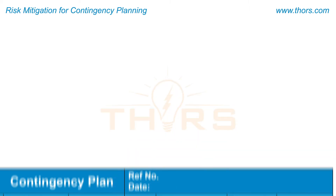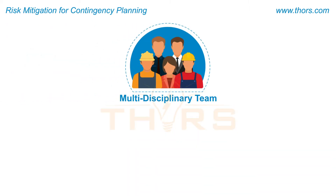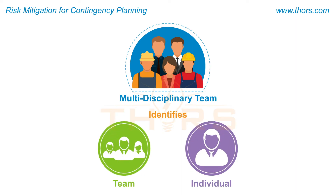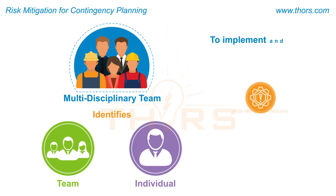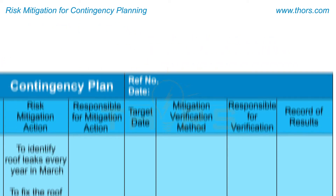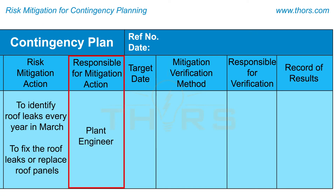Next, the multidisciplinary team identifies the team or individual to implement and follow up on the progress of the mitigation actions. For the leaking roof example, the plant engineer is assigned with the responsibility to fix the leaking roofs.